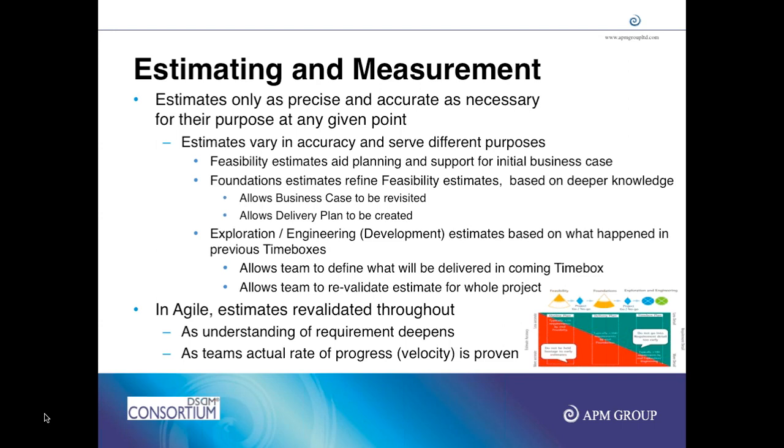If I assume 30 or 40 story points, and if you have 600 total story points, it will usually take us 1.5 years to complete your project. If we run a time box of 1 month, then we usually turn around 30 story points. Now this is only a very high level estimate, because we need something to start with.